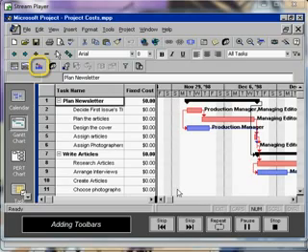We can also use the Go to Next Over-Allocation button in the Resource Management Formatting toolbar to locate over-allocations. The Go to Next Over-Allocations button is represented by a blue and red bar graph on the Resource Management toolbar. The active bracket immediately goes to the first over-allocated resource. If we click the button again, we see the next overextended resource.